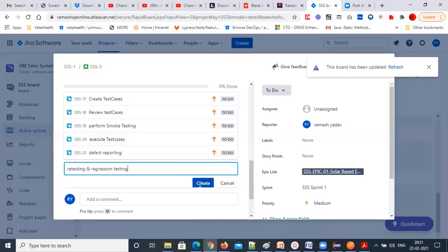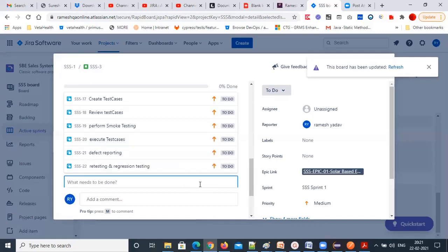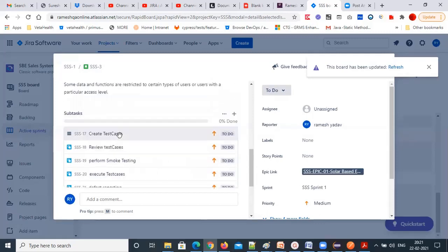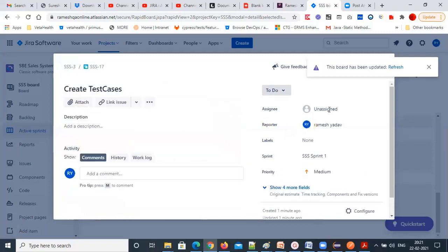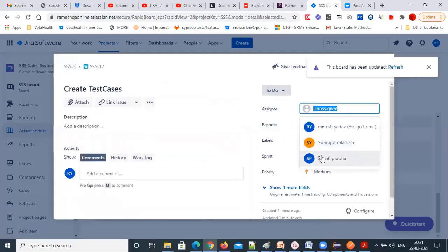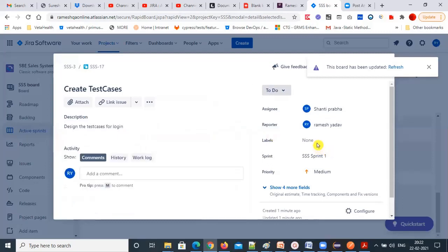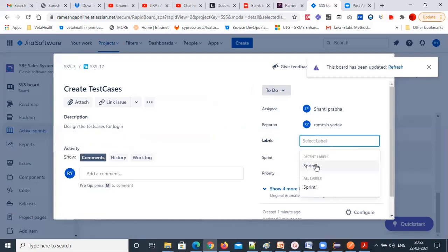These are all tasks created. The scrum master or yourself can create tasks for each story. I'll assign these tasks to team members. For 'prepare the test cases' — design test cases for login — labels can be set to 'sprint one,' and you can select how many days you need. I'll give one day to prepare the test cases.